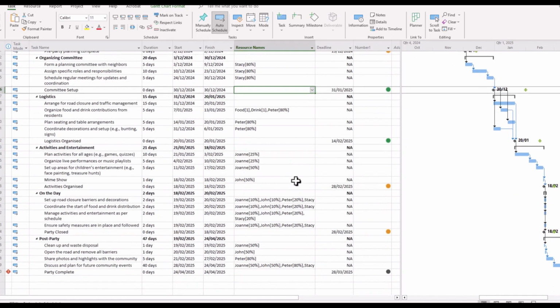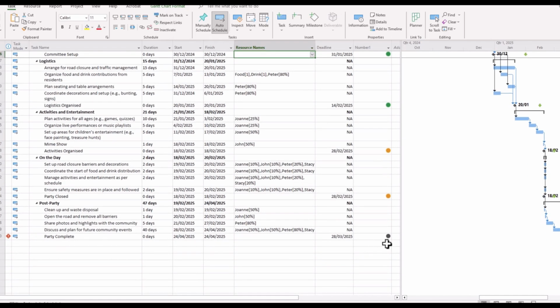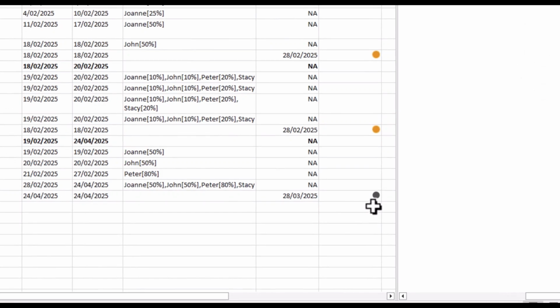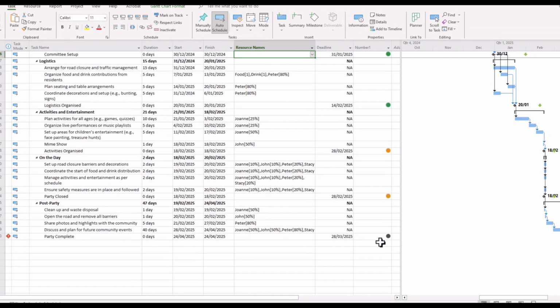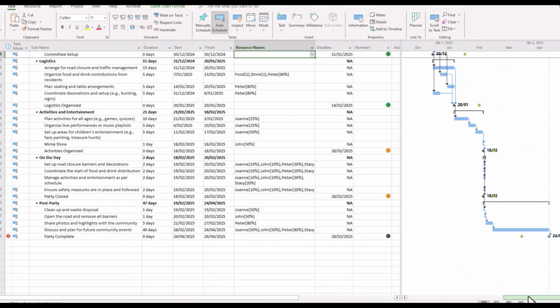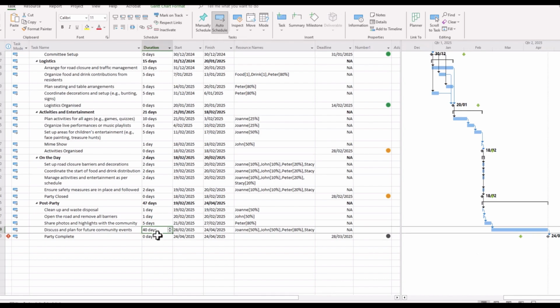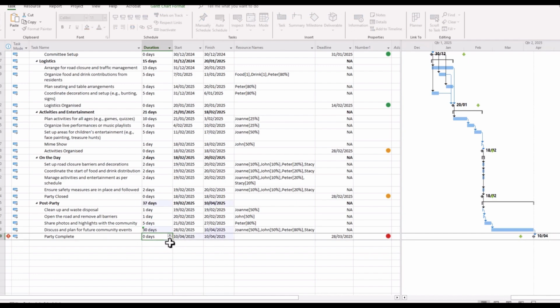But as we scroll down, we can see here, we have a black mark, or a black traffic light, so to say. This shows that we are well and truly overdue, and that is true. If we look at this, it is well out of range. It might highlight a mistake, or at least something that we need to fix rather quickly. So if we reduce that to 30 days, that last one that's making this milestone so late, we see that it turns red.